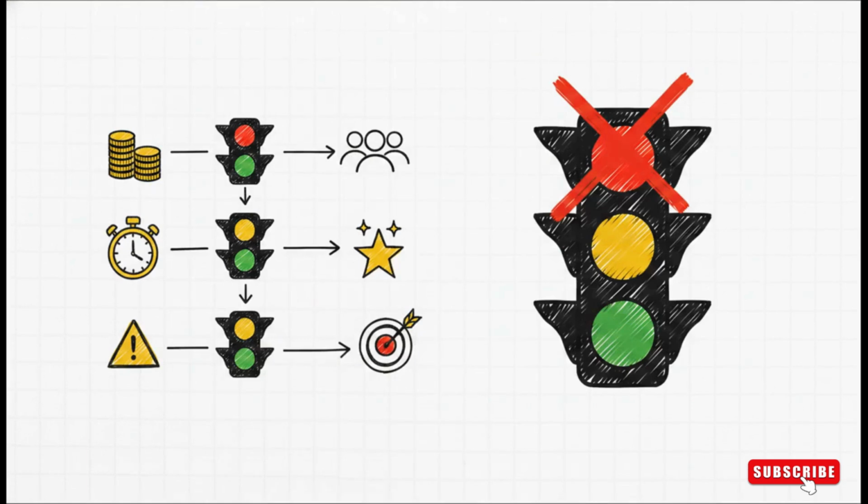However, relying on just a single overarching RAG color for an entire multi-million-dollar project, well, that can be way too macro to be useful. If a massive project is just labeled red, executives don't actually know why it's red. So best practices dictate tracking these distinct sub-RAG indicators. You really need to independently track things like cost, progress, risks, stakeholders, quality, and scope. By scanning these sub-RAGs, a steering committee can pinpoint exactly where a project is hurting. Maybe the overall status is red purely because the team's sub-RAG is red due to sudden understaffing. It gives you the full picture.